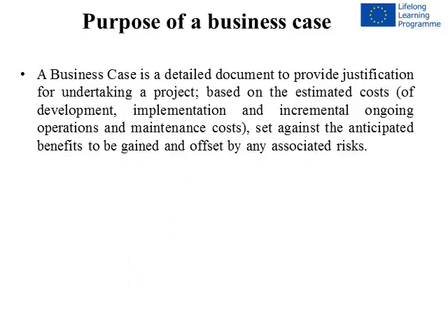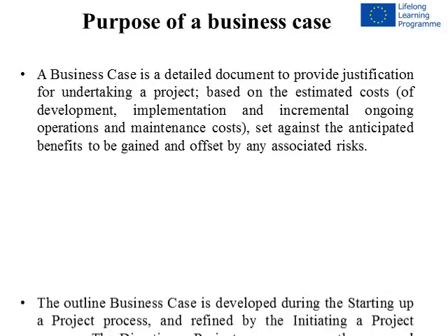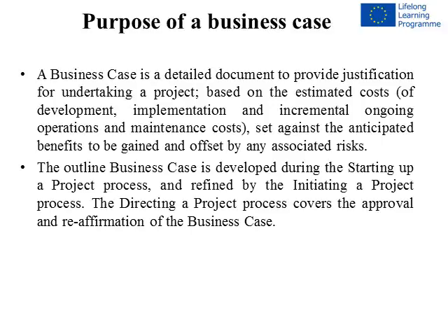A business case is a detailed document to provide justification for undertaking a project, based on the estimated costs of development, implementation, and incremental ongoing operations and maintenance costs, set against the anticipated benefits to be gained and offset by any associated risks. The outline business case is developed during the starting up a project process and refined by the initiating a project process. The directing a project process covers the approval and reaffirmation of the business case.